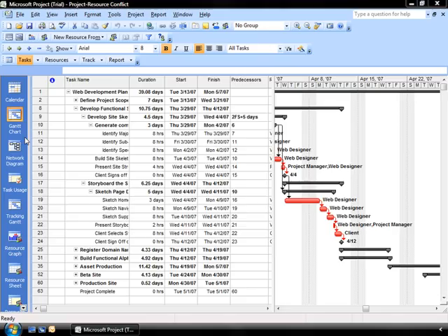Now, the application will take into account the following automatic leveling assignments. It's going to look at the resource's working capacity first. Then it's going to look at the resource's assignment units. It'll look at the calendar. It'll take a look at available slack and task dependencies. It'll look at the scheduling dates, the task's duration, constraints, and priority. Now, talking about task priority is something new that we haven't discussed before, so let's just take a moment